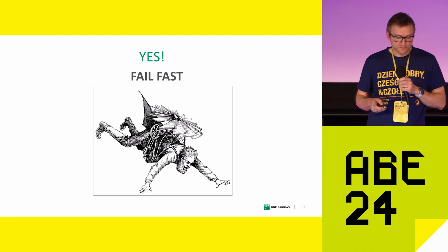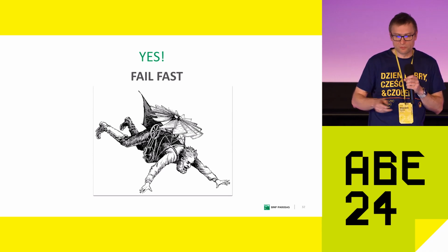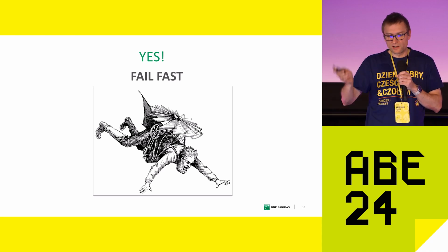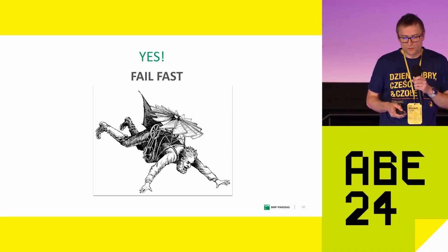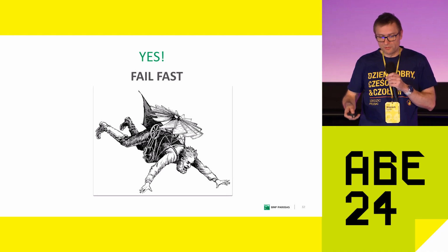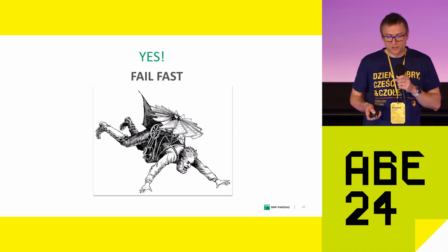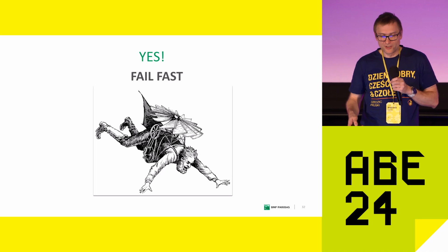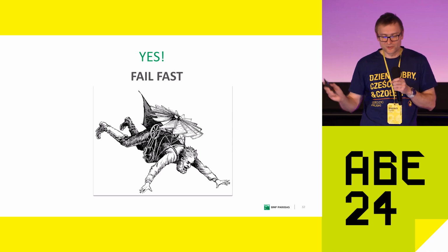The other is fail fast. We had some products. One was called Bank in a Slide. We were trying to draw all bank applications on one slide, something like a roadmap, but more visual, showing different areas, and it failed. It was a lot of effort, but no one used it. If we had waited until it was perfectly done, until these 5 cycles before we announced it to the organization, it would probably hurt if no one used it. Because we showed it to the organization at an early stage with lots of stupid things on it, the organization said, it's nice, maybe I will use it, maybe not. There was no "hell yeah" in the organization, so we just stopped doing this.